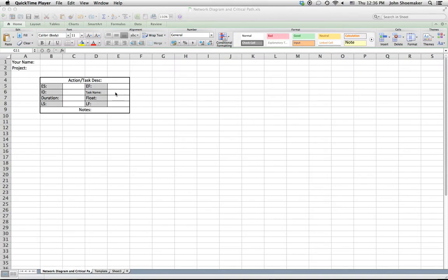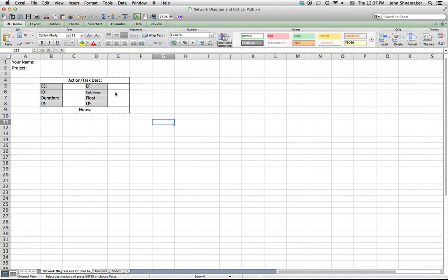Here we have the task name. Here I put in the name of the task. Some of you have gotten feedback from me that your activity names are too long. Here perhaps you can see why, because this is a very small box. The same is true if you are using the computer. The names of activities have to be short because otherwise they get chopped off, and if you don't recognize the first 10 or 15 letters, then you may not know exactly what activity that is.